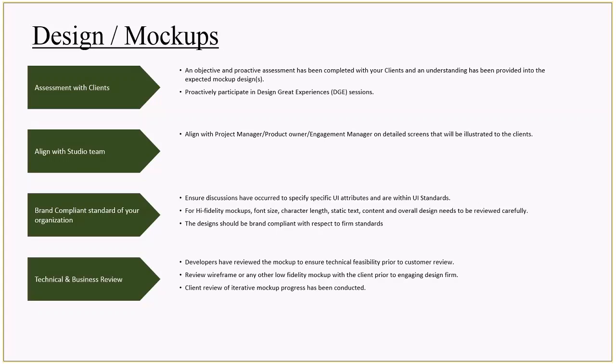One more review has to be done, which is the technical and business review. The technical review is required because some of the requirements or design mockups may come from business, which we can draft or mock up, but when it comes to actual development, it may not be feasible to design. So developers need to review those mockups and ensure technical feasibility before we review them with the customer.